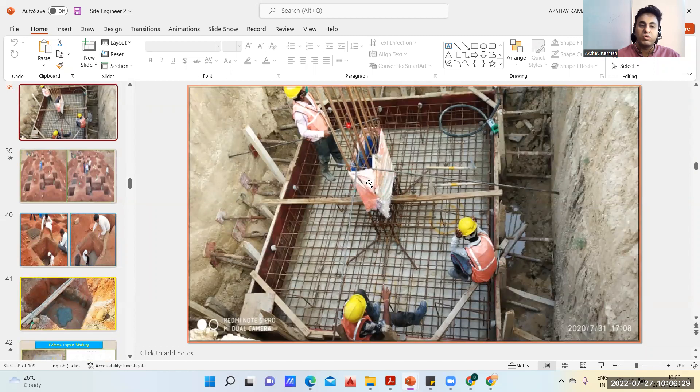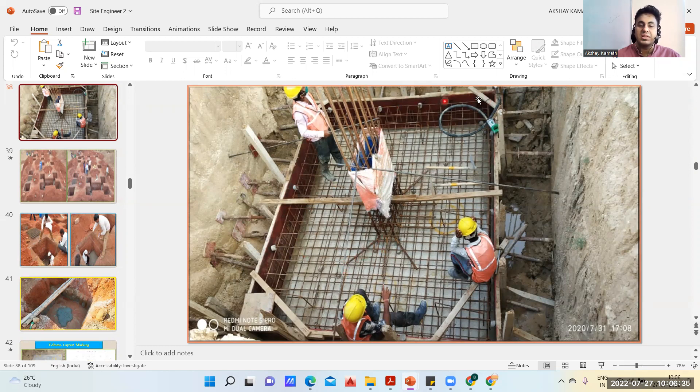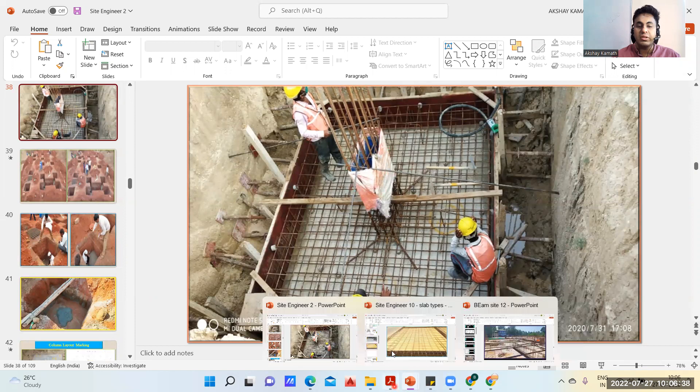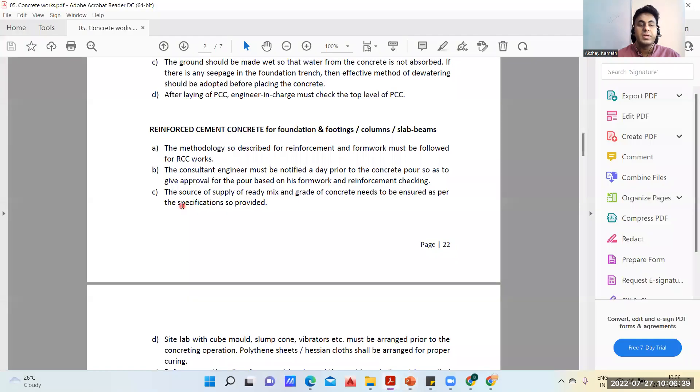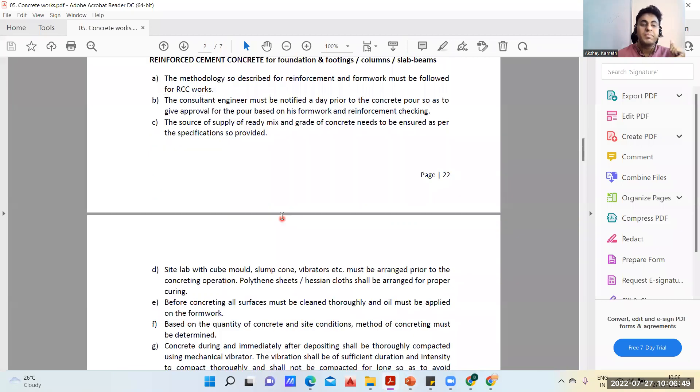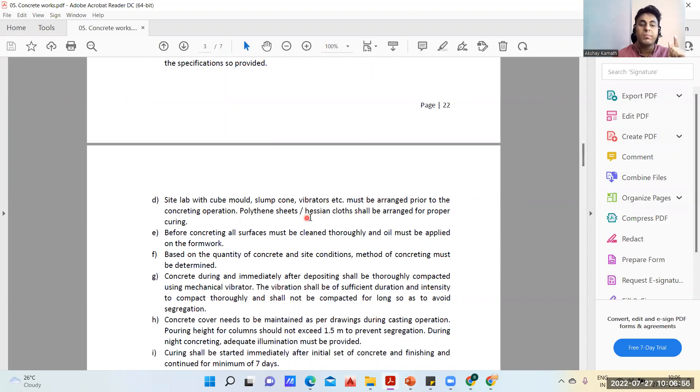We have to check everything: whether the cover block is given or not, whether your needle vibrator will be ready, whether you've covered your reinforcement for the column, whether the development length is clean, check the footing dimensions - the length, breadth, diagonal and all. The source of supply of ready mix and grade of concrete needs to be ensured as per specification. Usually M20 is a minimum grade of concrete.